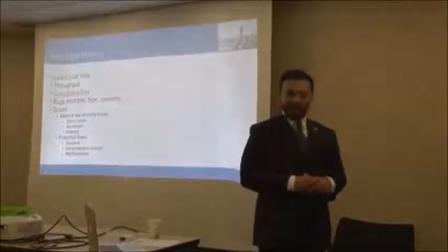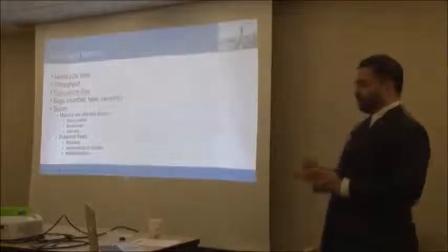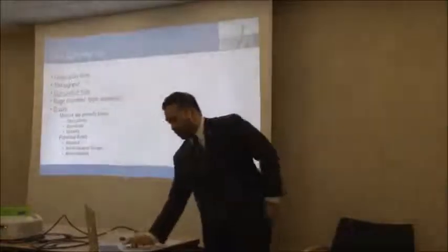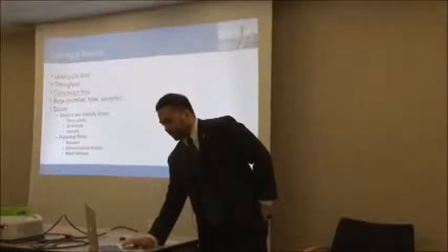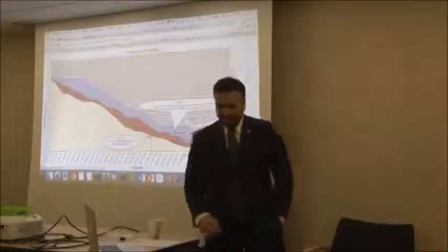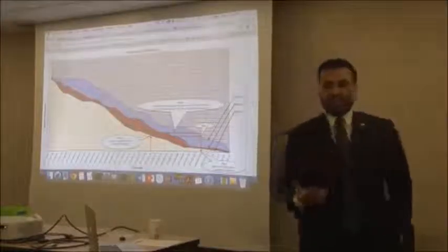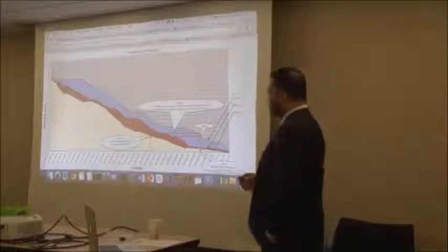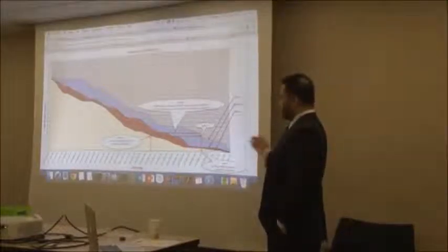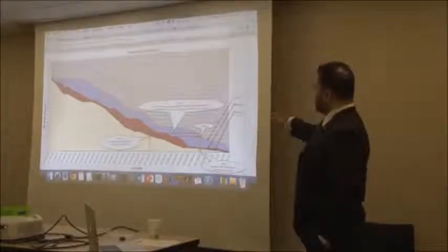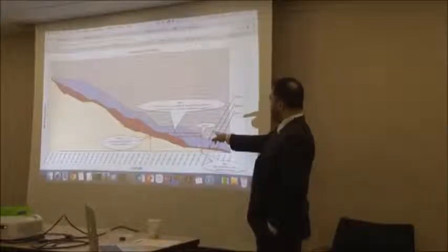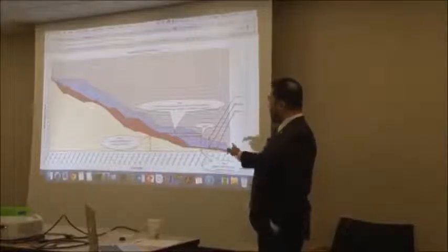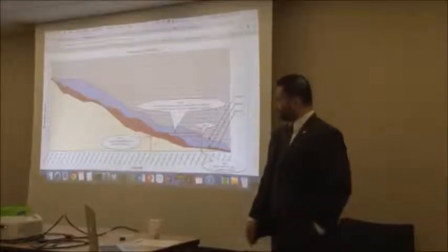So there are some core agile metrics that everyone kind of knows about. We've talked about lead and cycle time. We talked about throughput. There's this one called cumulative flow, which basically takes tasks and categorizes them in some way, however you want, and puts them on a graph based on the number of tasks and time. Basically the purple is what's left to do, the red is what we're in process of doing, and the white or the beige is done.